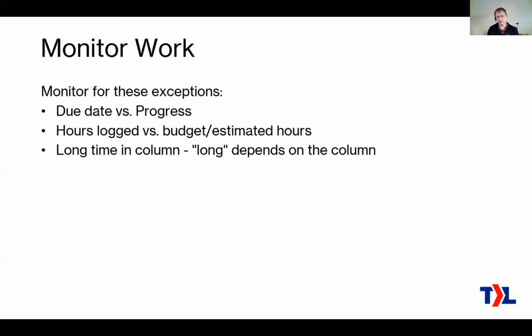If it's waiting for a customer, for example, then maybe it can sit there for maybe up to 7 days. That's probably longer than ideal anyway, but the exact number depends on what you're comfortable with. But definitely the threshold there is different for every column.